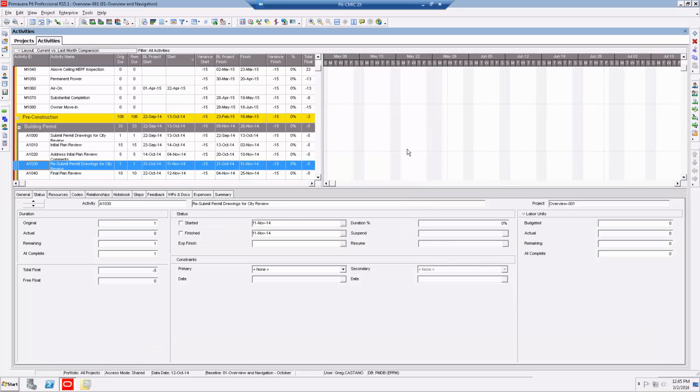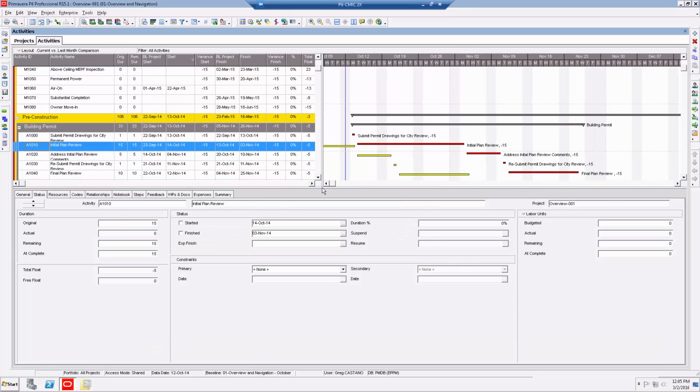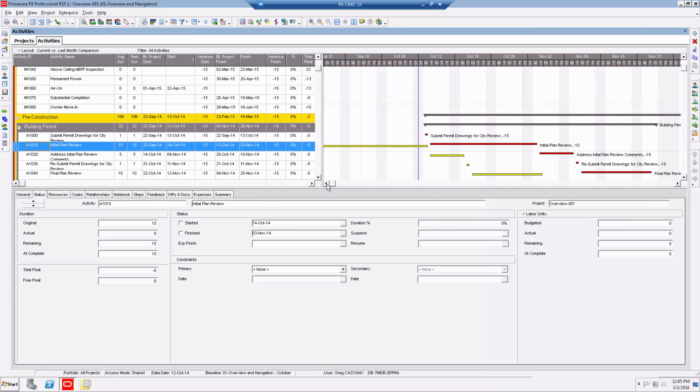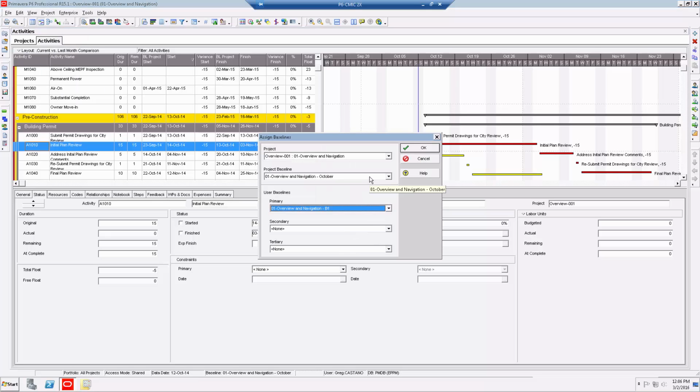Say Open. So this particular schedule will show your current, which is critical, it's the top one, versus last month, which is the bottom one. So those are the two different layouts. Again, in review, you have current versus last month, and for that, you have to assign every month. You snapshot it and make a copy, and this is the maintenance that you do every month.